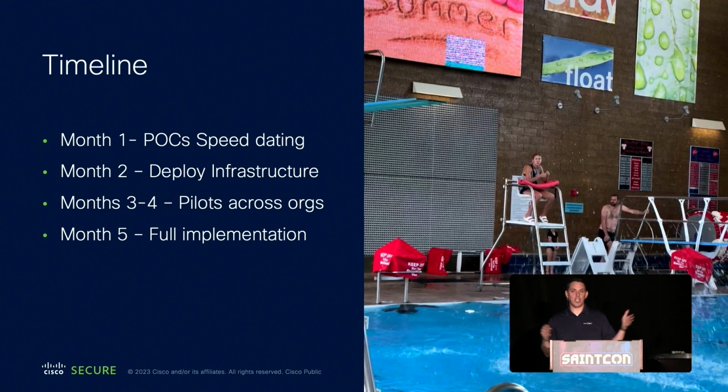Now, at Cisco, we shut down from Christmas Eve through New Year's. And so we had to make sure it was done. December had to be done essentially by like the 16th to the 18th. Because if it's going to have crap happen, we had to be able to prepare to be done by the 23rd and make sure we were safe.